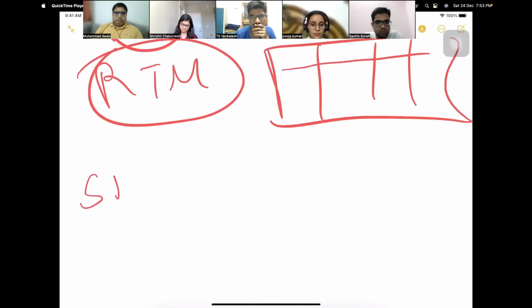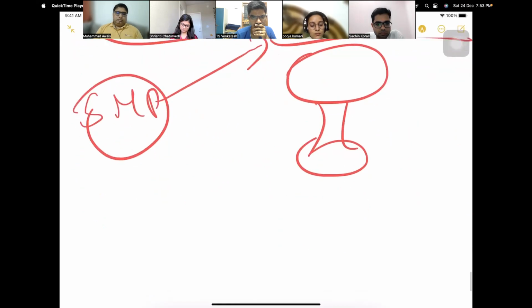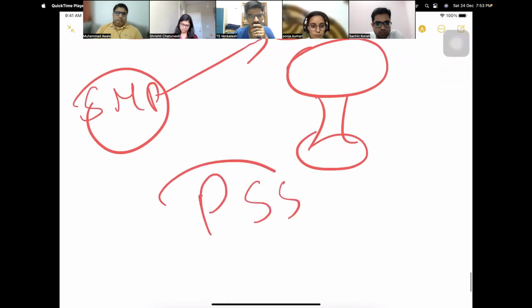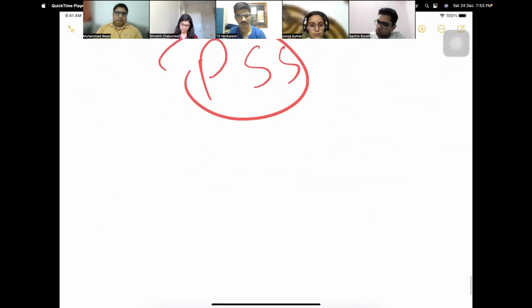Then using the scope management plan, we filter out the requirements and we see which requirements will come into the project scope statement. To put the scope filter, you can even call it MoSCoW, product deliverable, whatever. We get the project scope statement.